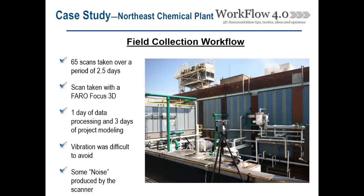After the two and a half days of scanning, it took about a day to process the data, register it, make sure it was clean and accurate, and check for discrepancies. Some scans had to be thrown out due to vibration, and additional or adjacent scans had to be pulled in. The older scanner also produced a little more noise, but the software did a great job recognizing and working around it.